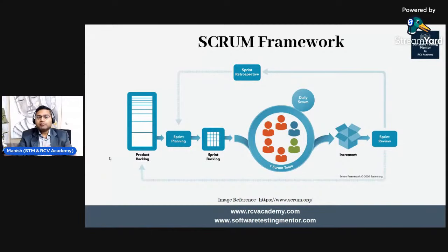And usually in the product backlog, you will have either the features. JIRA is very widely used, so all the product backlog will be managed within JIRA. The backlog will be created as a high-level epic. Some people directly use the epic, or they will create a custom type of feature. If it's a big project, they'll have big features, and within the features there'll be epics.